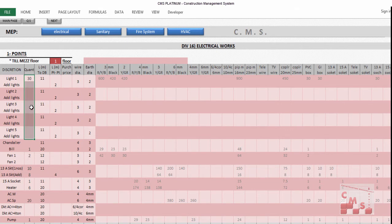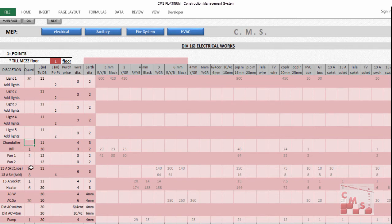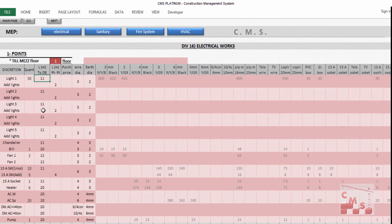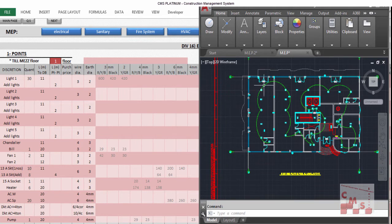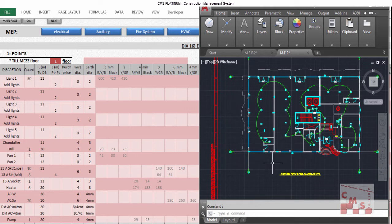So you have one main light and the others are additional lights — that's the meaning of main and additional. Insert them according to types for each floor and multiply by the floor repetition. For bells, fans, change layers, and whatever you have on the ceiling, add them the same way. Put the length between the main light and the DB, then the length between each additional light and the others — this can be an average length, not required to calculate one by one. Add a good margin.